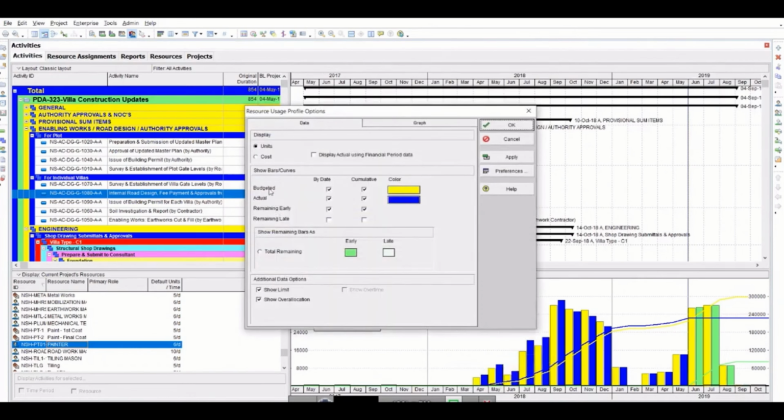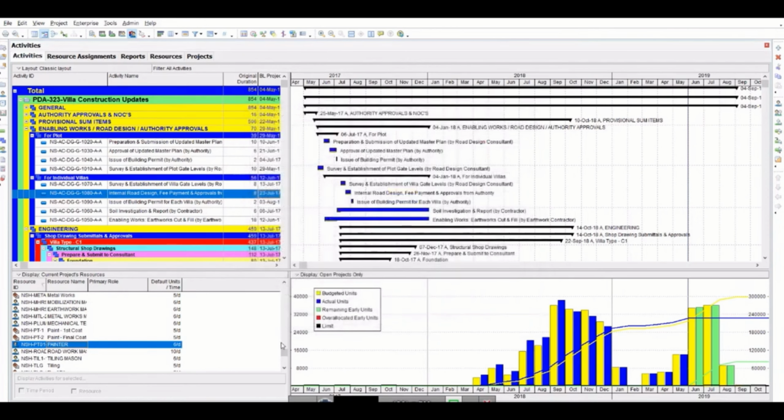So we know that budgeted units are never used in earned value management. Because performance means the standard should be locked, which is the baseline unit. So if this painter, carpenter and this mason do not have baseline unit, that means their earned value management cannot be done. We cannot say that the CPI of the labor is this, CPI of the carpenter is this. What we can say is the CPI of man hours is this.